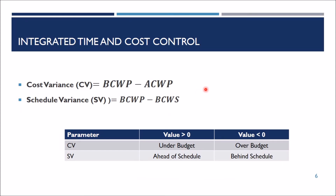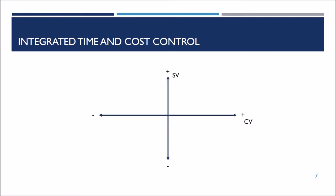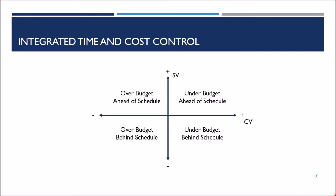The cost variance (CV) and schedule variance (SV) tell you whether your project is on budget and on time or not. If the CV and SV values are greater than 0, then you are under budget and ahead of schedule. It is important to know that there are many cases for the variances. This is the best corner, as your project is under budget and ahead of schedule, and this is the worst corner, as your project is over budget and behind schedule.